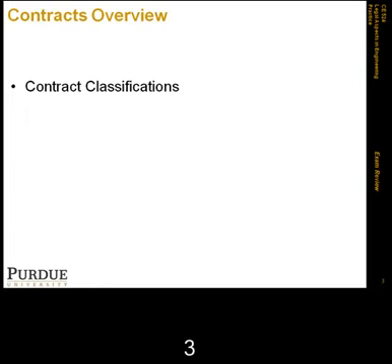We also talked about an important classification of bargain contracts versus contracts of adhesion. We talked about negotiated contracts, where we have two parties of equivalent bargaining power being able to enter into negotiations where there's give and take, and then they mutually agree on a satisfactory agreement. Contracts of adhesion, on the other hand, have limited or no bargaining, and the dominant party basically hands a contract on a take it or leave it basis to the weaker party, and the weaker party has to accept all the parts, all the